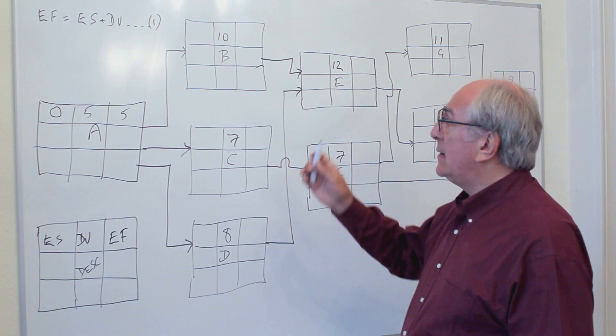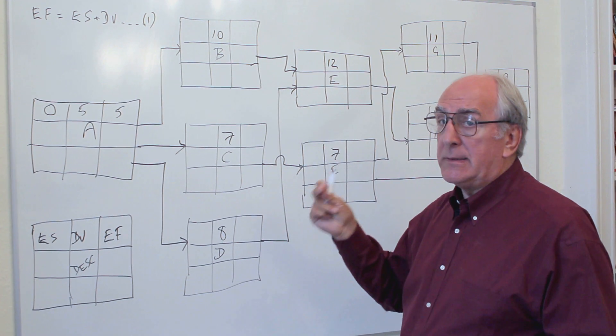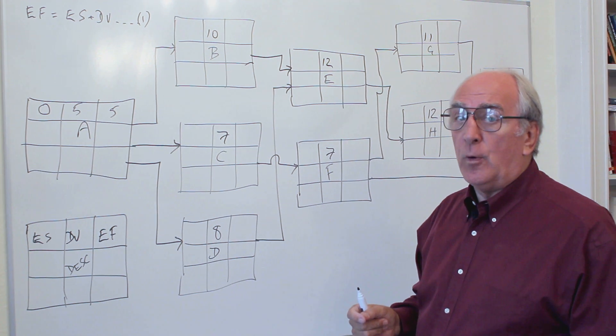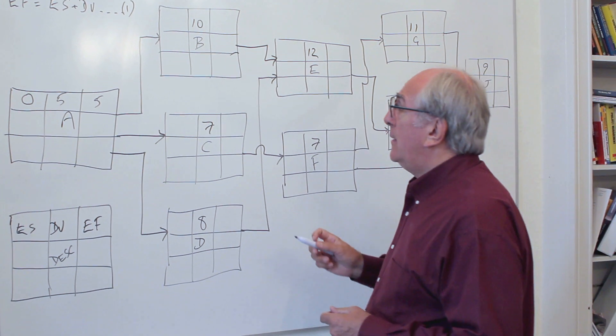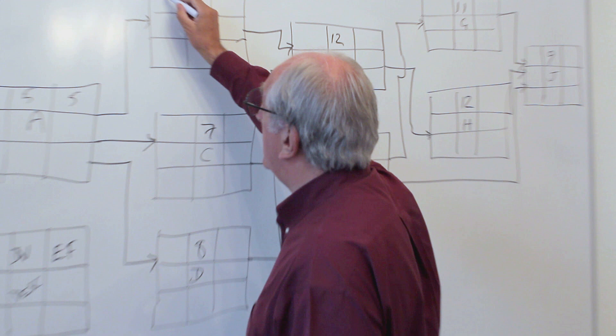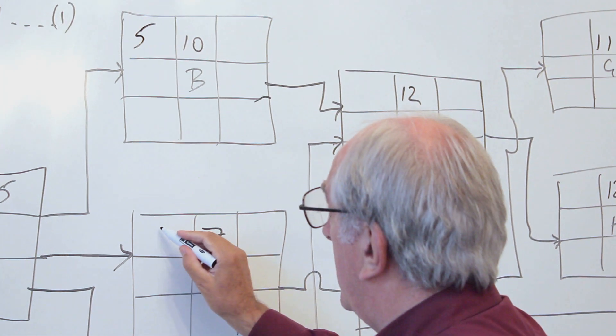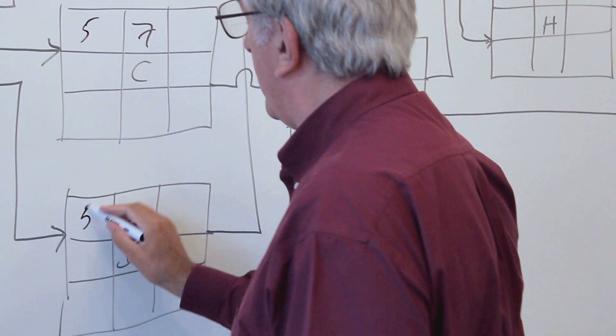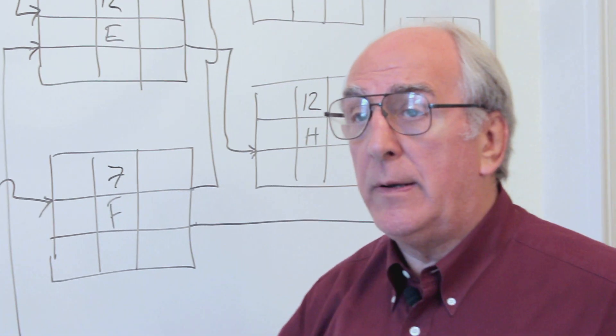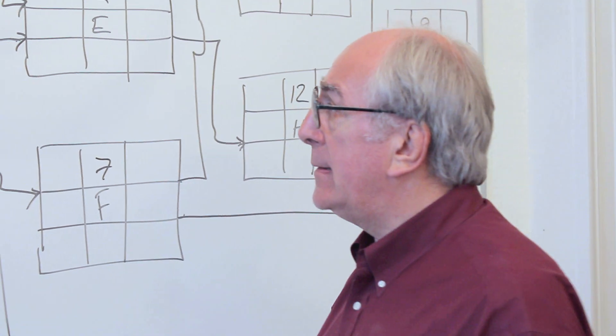We now need to know what's the earliest possible time we can start activities B, C, and D. By the same reason we used for time zero, we're going to say we can start B absolutely a tiny period before the end of period five. So we're going to say that starts at period five, period five, period five. We're not worrying about anything other than these pure time units.